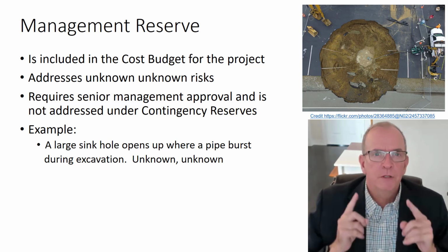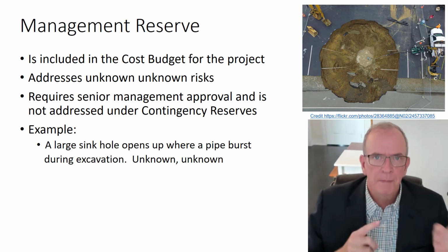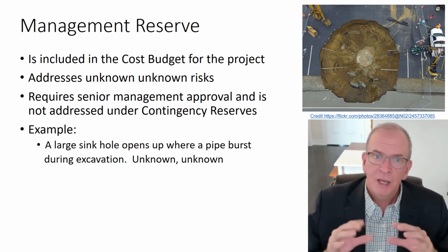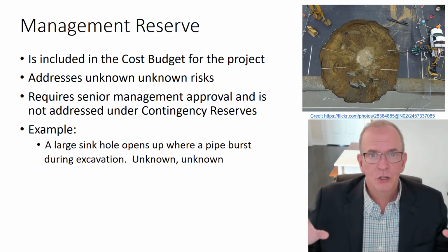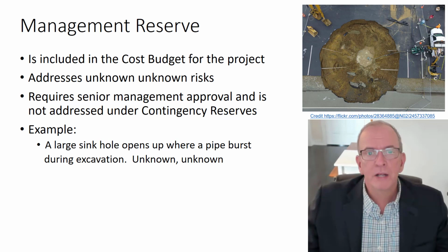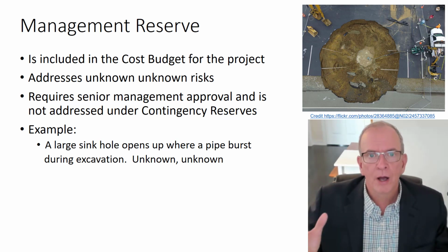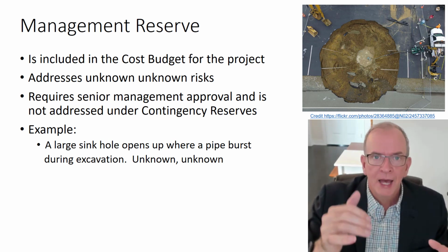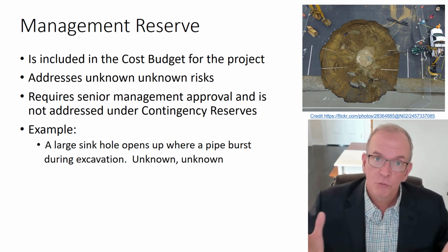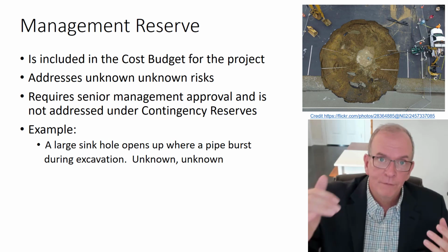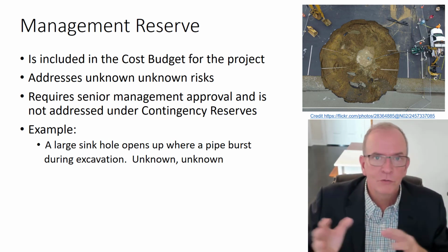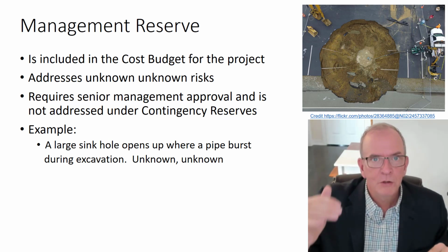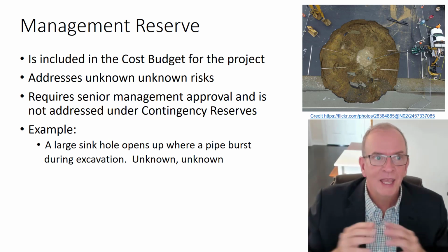Now, a key difference too between a contingency reserve and a management reserve, and PMP sort of outlines this as well. The contingency reserve, the project manager would have in their direct budget for the project that they are managing and controlling. So they could draw on that if they needed to. And they should really only, as I said, be drawing on it for those risk levels. It shouldn't be used for other types of things like the office party or that sort of thing. It should be used for those risks and those risk mitigations.